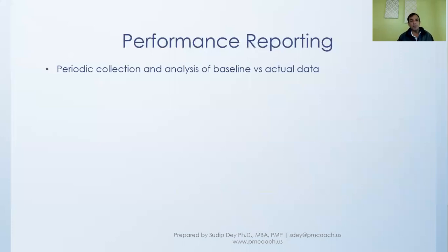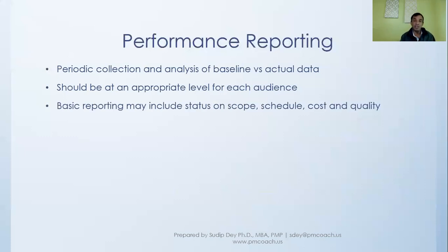For example, there will often be periodic collection and analysis of baseline versus actual data. That's what we talked about. Then when we do that reporting, it should be at an appropriate level for each audience. Like we said before, not every audience looks at the same level of detail.